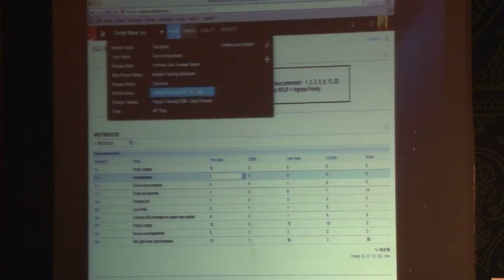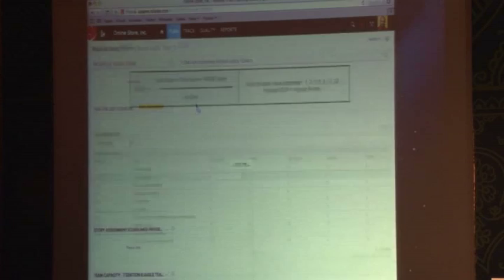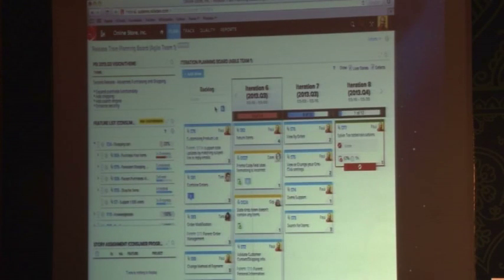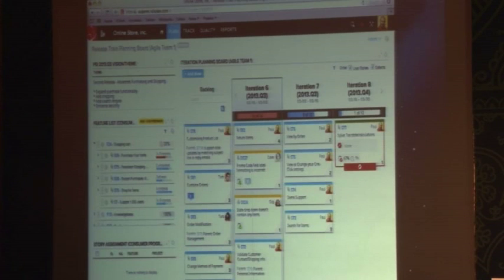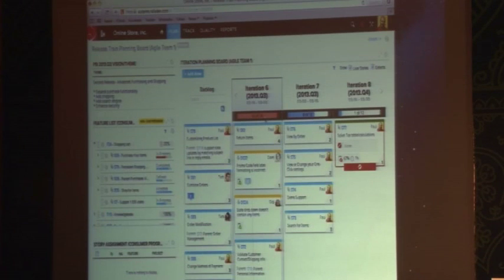Every single iteration when you're performing planning on the iteration planning board, for each iteration and each team, you can set their velocity. At the top you can see the team's velocity — for iteration six of PSI Q3 2013, their estimated velocity is 14 points and they currently have 16 points worth of work scheduled. For each iteration we can see whether or not it's overloaded. At an individual level, each team member can determine their capacity for each iteration so we can make sure individual team members aren't overloaded.